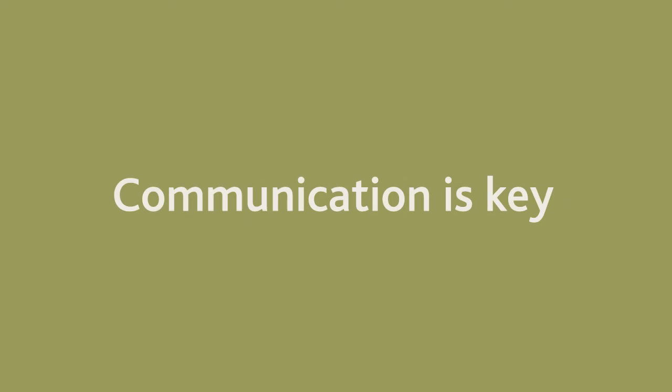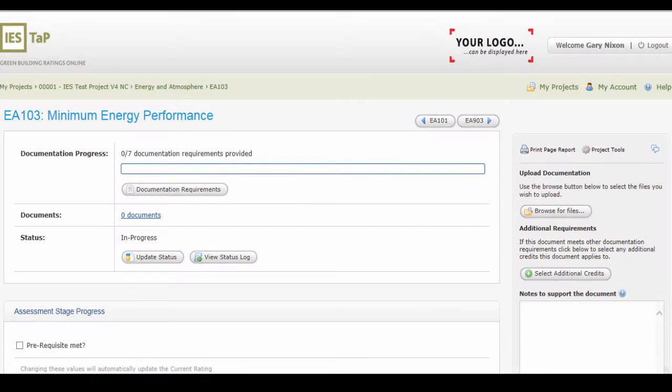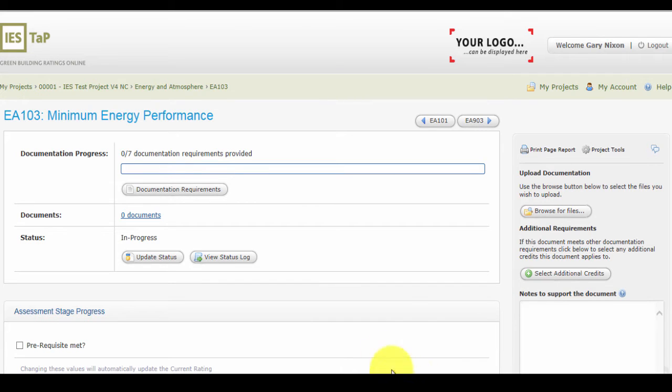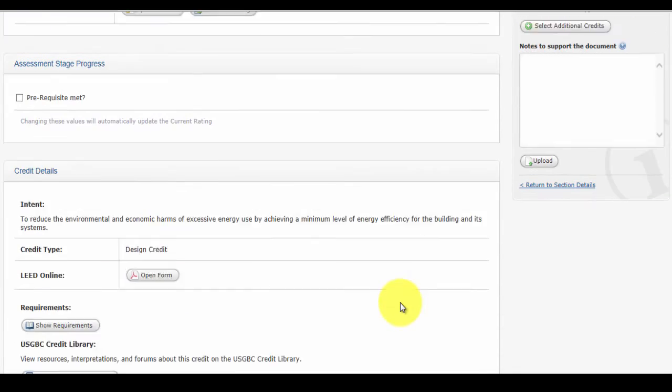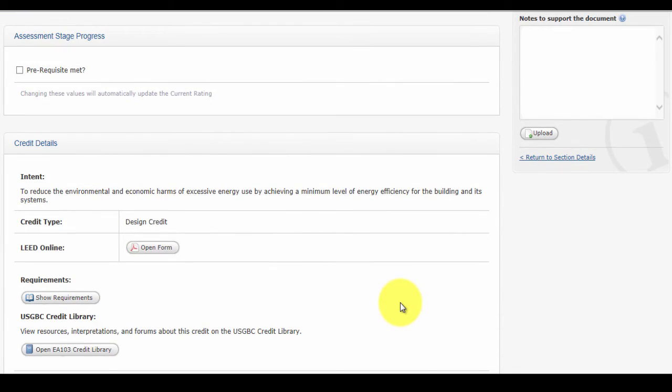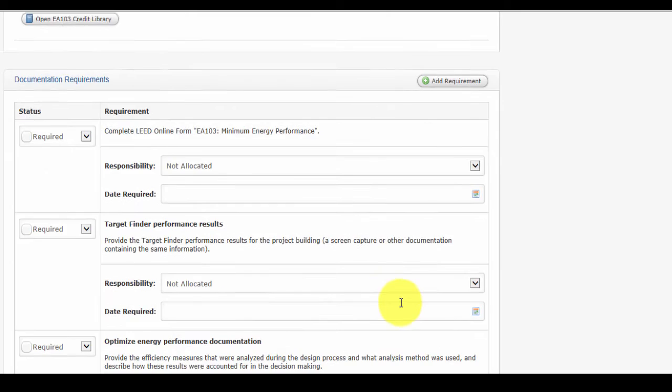For LEED version 4, the LEED online system no longer lists the documentation requirements. The documentation requirements are listed on the LEED form itself, which can make gathering of the documentation harder to account for and manage. IES TAP cleverly reads the LEED online forms and directly pulls the documentation requirements listed for the LEED version 4 forms and lists them under the appropriate credit in IES TAP.